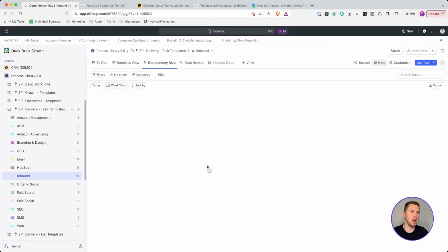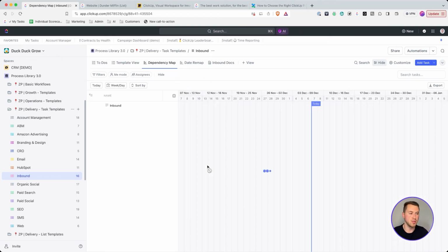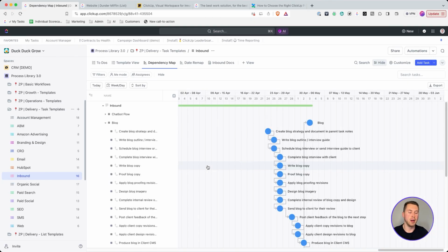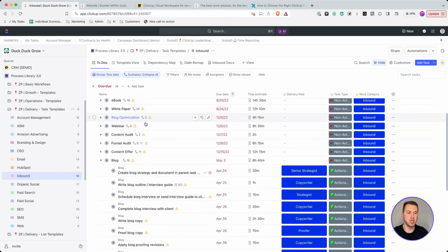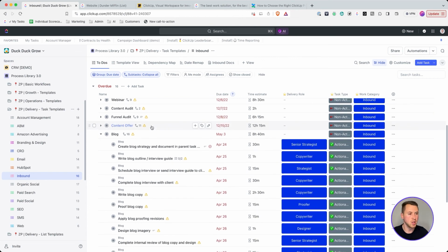In addition, I have dependencies built in, which are super helpful when it comes to moving due dates, because I can use the dependencies to take a task, and basically if I drag this, everything else will come with it. Again, that's another video I have up here on the channel if you want to watch it, of how I actually use the Gantt view to remap due dates. But as you can see here, this process, this workflow is all built and ready to go.